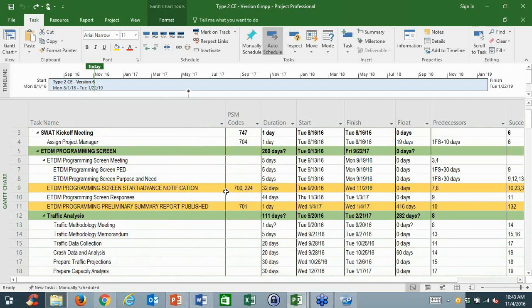And as to the false readings specifically, we were actually trying to correct that. In previous years, Type 2s and environmental assessments in particular had, quite frankly, bogus start dates. They would have NTP start dates for contracts and things like that. That's not when your PD&E actually started. So you would have PD&E studies that were Type 2s that were taking 4 to 5 years, when if you took out and actually figured out where the Type 2 started, it was much shorter. So we didn't want the false readings continued. It's one of the reasons why we separated it. But it's like Margie said, the setting up of the project for PD&E, we wanted to document that, and then hopefully that will streamline the PD&E itself.